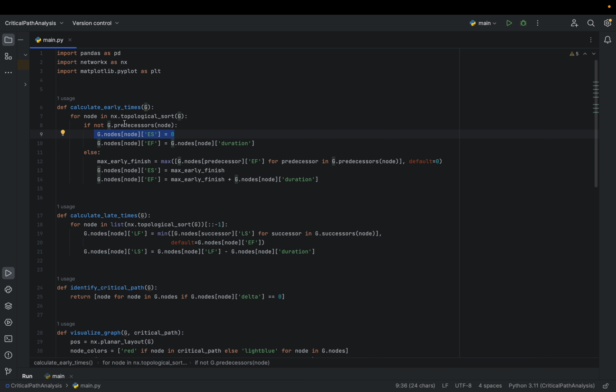If there are no predecessors, then we can immediately start it. That is the earliest start, ES. So ES we can set as 0. And if there is a 2 days duration for the task, then we can finish it by those 2 days. So we are setting the duration for the nodes without any predecessors, which is requirements in our case.